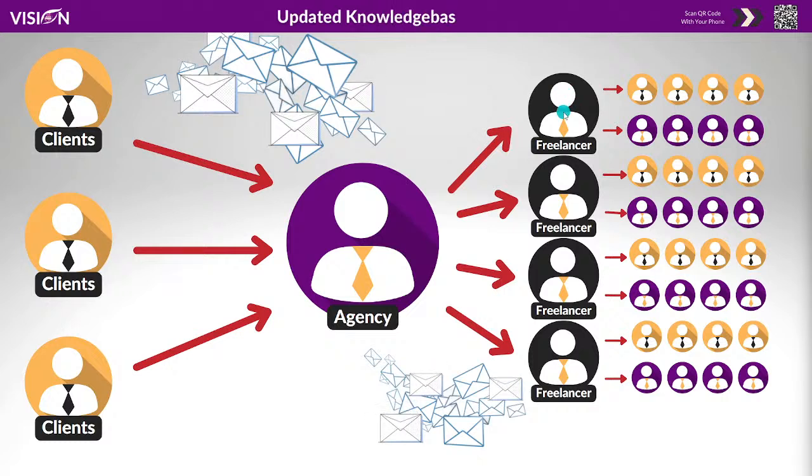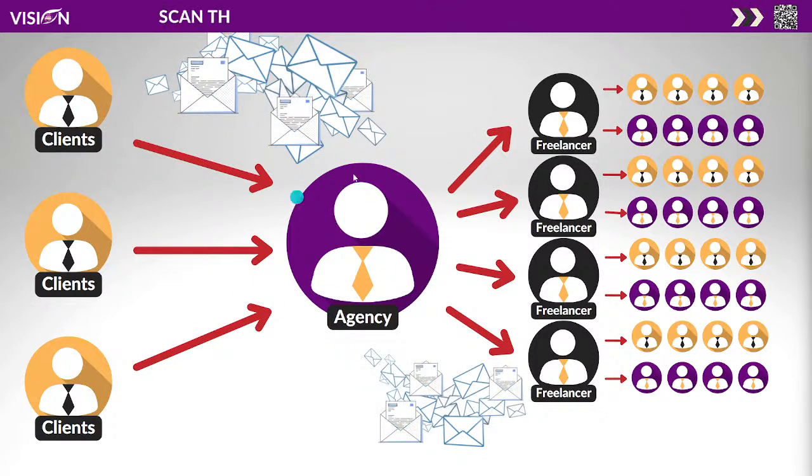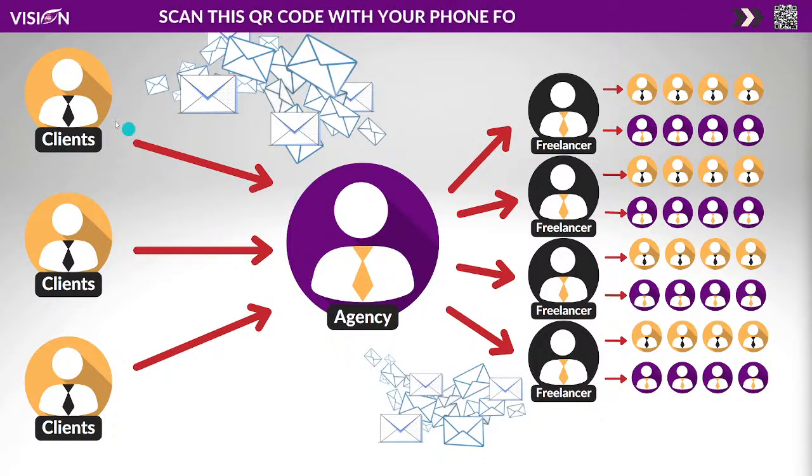Okay, so now what happens? Freelancer says, okay, sure, I'll make those changes for you. It's going to take me about an hour to do that. I'm going to charge you $200 an hour. So now you, as the agency owner, you either need to make your client stick to that standard, or you need to charge your client the additional $200 an hour.